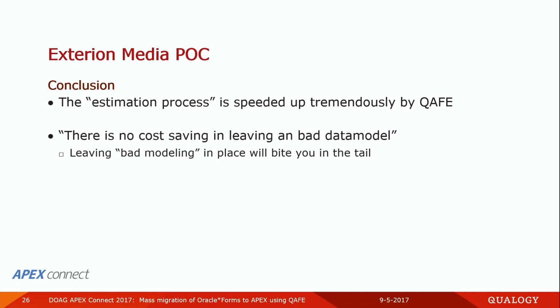Okay, what's the biggest conclusion? Using QAFE will speed up your estimation process tremendously. Instead of hours per form, I was using only minutes per form. So I was able to do an estimation in 3 days instead of 3 weeks.